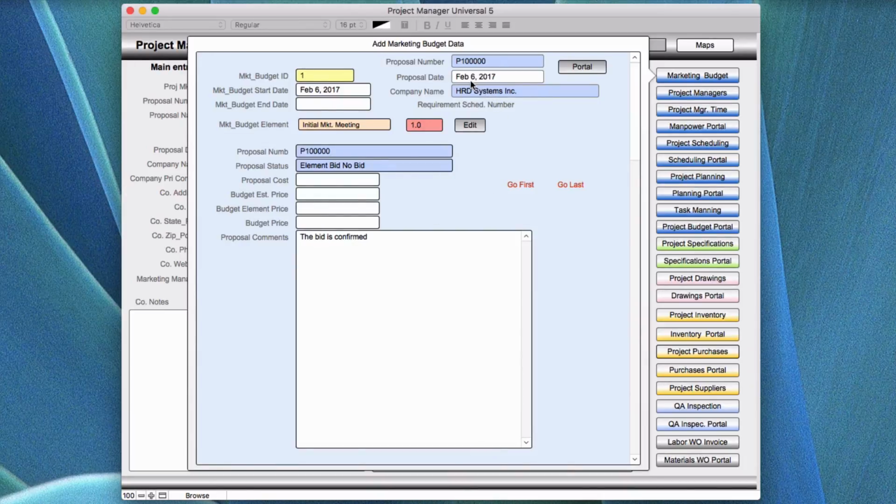or how many more trips will I have to make out to that location to do the survey if there's muddy fields and we have to wait for it to dry for a few days. That's going to actually impact your planning. If you don't build some kind of a relief for issues like weather and identify those and make notes about them, you can even look forward, say maybe 10 days out from the date that this is occurring as far as when you're starting it, to make sure that their weather forecast will meet the requirements of actually going out and doing the work, or you're going to have to change your timeline.